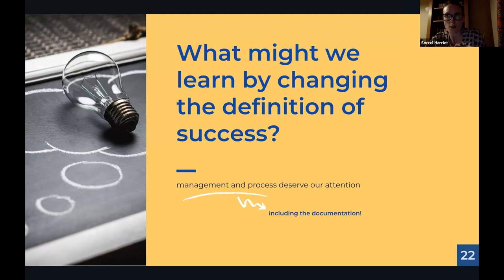So how and when you document software is affected by your process and other things too, the resources available and the audience and the requirements of the documentation and all of that, as Stefan's already mentioned. But to give you an example of how it's affected by process, if your process is more iterative and your destination is less certain, then you're not likely to be producing lots of detailed upfront documentation. Whereas if your process is more waterfall-like, then it makes sense to document more early on.